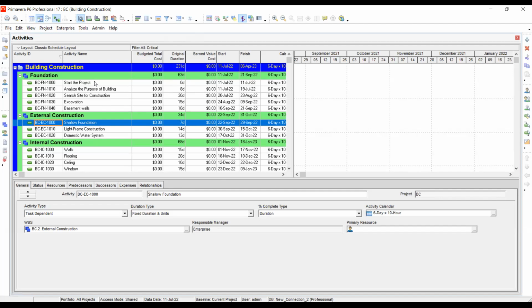All right, okay. So now I think you have the PowerPoint presentation that I sent you. According to that presentation, in session 6, on the second slide, there is a task that you have started. Create a project named building construction, and create and assign a project calendar to the project, which has 6 working days per week and 10 hours of working time. Give holidays as 13 July 2002, 15 September 2002, 2nd October, and likewise I gave some other days.